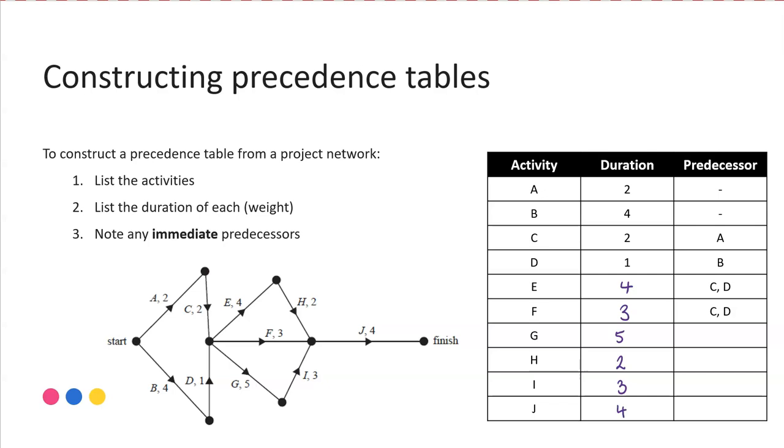Finally, we're looking at the predecessors. So we're making sure that we're noting down all of the activities that end at the vertex where this next activity commences. So if we're looking at activity G, we locate G on our network and check this vertex here, where G starts from. What activities are flowing into the end of there or finishing at that point? C and D. So they are what we call our immediate predecessors. So we put activity C and activity D.